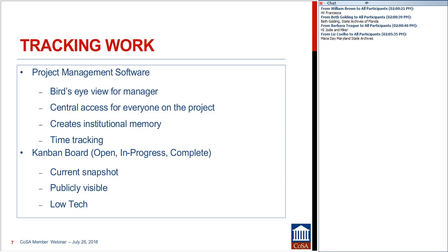This provides the project management team, and the project manager in particular, with a well-needed, super important bird's eye view of what is happening in all elements of the project and how the work is being executed along the way. So the common features of each of these programs are that they allow for a space for each task to be described, for due dates to be assigned to them, and for them to be sequenced so that work is being completed in a logical order.